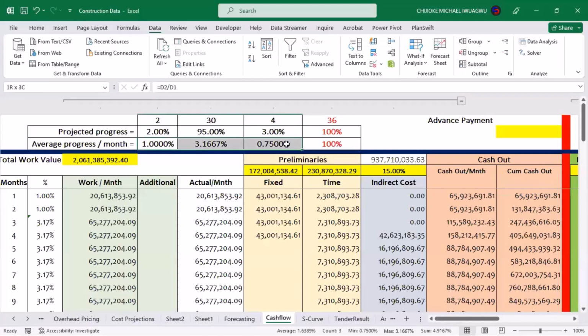These things I'm saying, I'm just breaking down here. This is more like a straightforward rule. Different organizations have different ways that they determine their work progress that they will input on the discipline. But for easy reference, in this program I have here, you can subdivide your own progress into multiple progress ranges. For purpose of simplicity, I have made it into 3 different ranges so that we can have something like a parabola, whereby we start slowly, then we crescent up to 30 months, and then we bring it down again and wrap it up. Simple parabola.